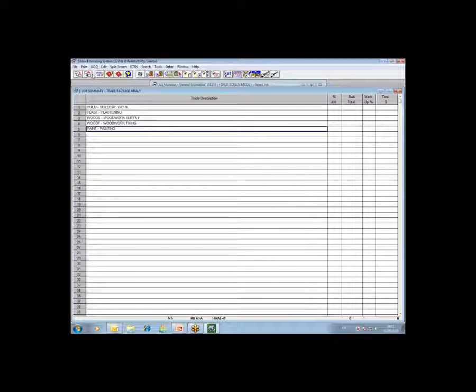Now, in terms of the resourcing codes, in this instance we're creating subcontract packages for subcontractors to supply prices for. These resourcing codes can be used for other uses also. If you can think of why you would maybe want to resource a bill of quantities to extrapolate it out in a different format, you can simply code up the bill, run the analysis on it, and it will resort that particular bill into the format that you require.